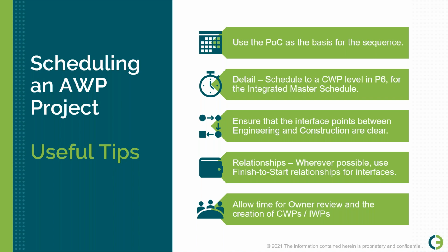What we're trying to avoid is that old school habit of, at 30%, we've got this long bar like we were looking at in the previous slide, and at 30% we take a lag off that bar and move into something else. Fewest number of lags and links like that possible. Most of it should be: this engineering work for this package is complete, finish to start, then construction can start.